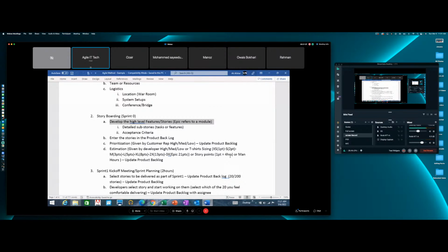The next thing, once we have identified the 5 modules, we'll start to take little sticky pads and write the functions on them. We're going to take different color sticky pads. We may take a green sticky pad, an amber sticky pad, a pink sticky pad. Why the different color sticky pads? Importance level, priority. We want to use the priority. So let's say the pink we'll consider to be high priority. The amber, orange can be medium, and the green will be low priority.